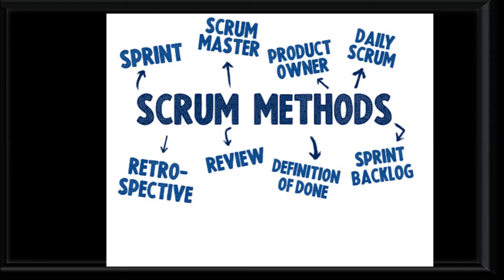The scrum development team is cross-functional — the team has all the required skills to develop the product within the team. The scrum development team works collaboratively, shares responsibility, and is accountable for the successful delivery of the product assigned by the product owner. The scrum development team is completely responsible and accountable for the quality of the product. Once the team is finalized, the team does not change during a sprint or afterwards, as any changes will bring them back to the forming stage and cause performance issues.